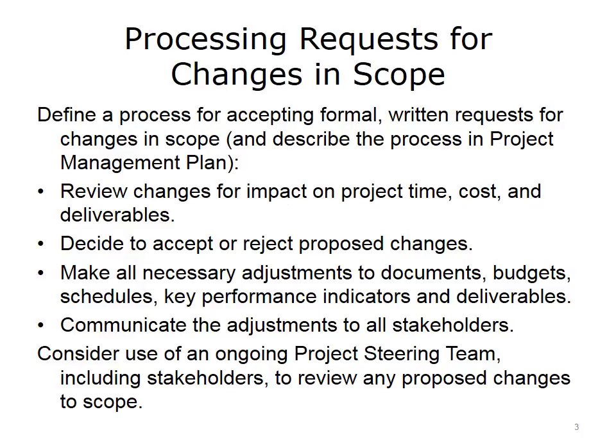As you are managing scope, remember the importance of explicitly processing requests for change of scope. It's not that scope can never be changed, only that you ought to make it an explicit process when there are requests to change the scope or change the requirements on the project. It is important to have a clear path for accepting requests for changes like this and a process for evaluating those changes. Then the project team can determine the impact on project time, schedule, costs, and deliverables. These implications will guide the decision to accept or reject the proposed changes.